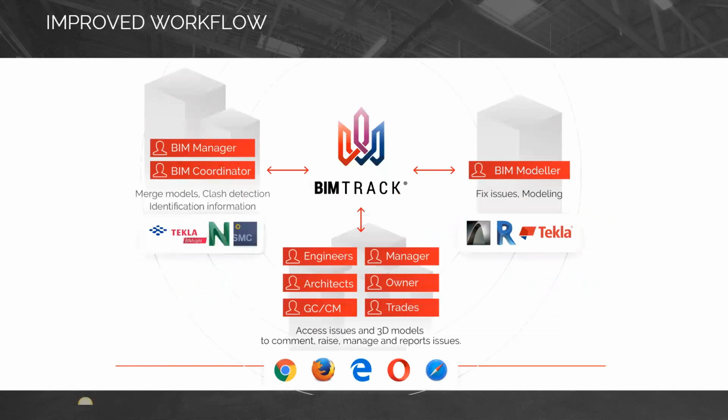With BIM Track, we are going to improve this workflow by managing the issues. Again, the BIM modelers create the models and share with the BIM managers and coordinators. They, in turn, merge the models, inspect for quality assurance, execute clash analysis, verify information, and so on. They both publish issues directly to BIM Track, and both have instant access to it.